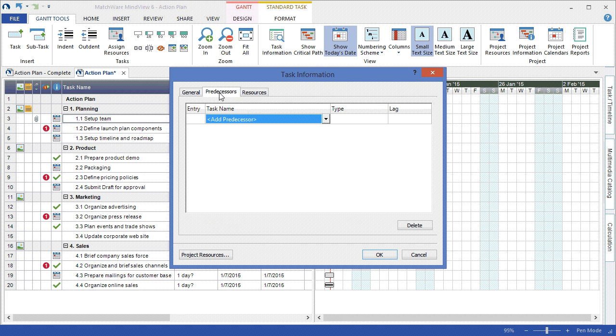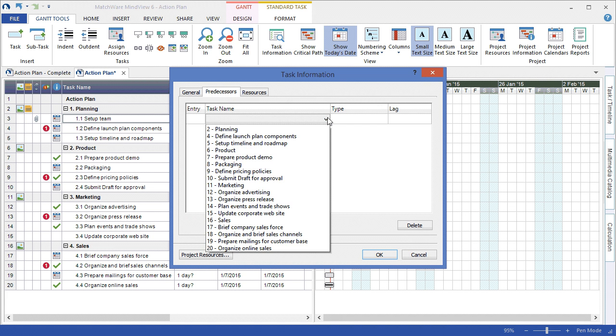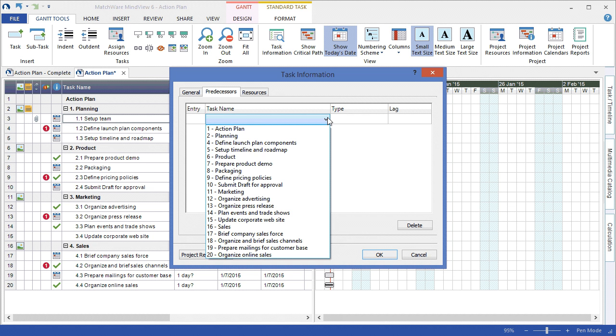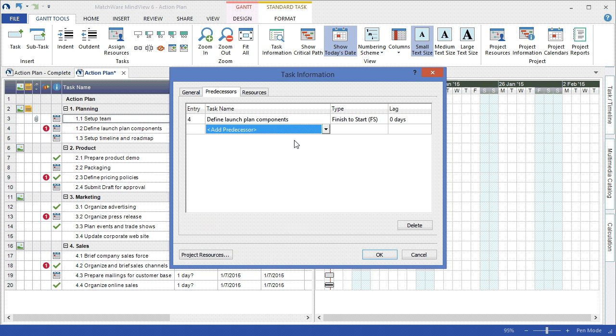In continuing with the tabs, I can choose the Predecessors tab and associate a dependency or predecessor to the selected Setup Team topic. I can choose the specific predecessor type and associate any lag time.